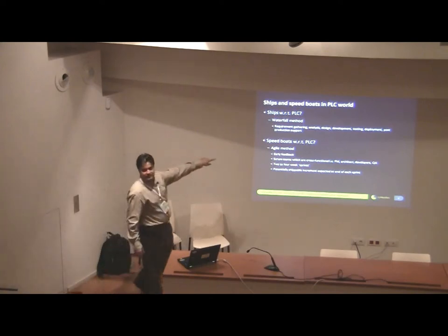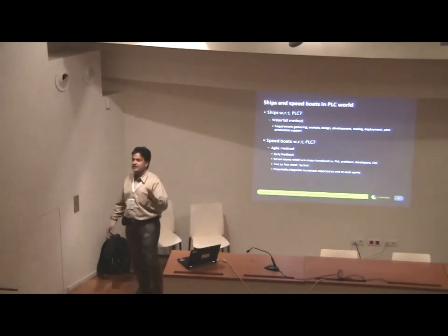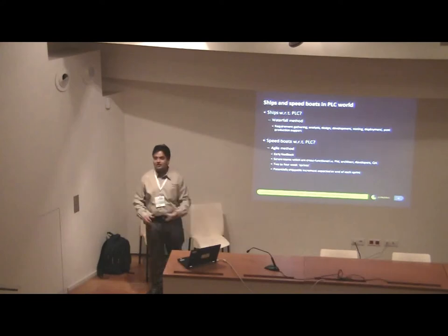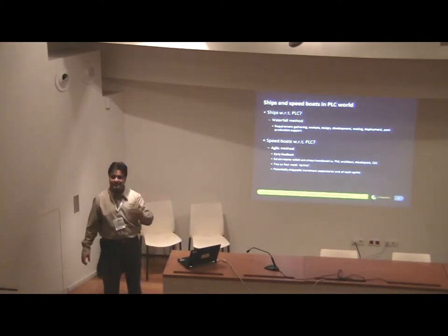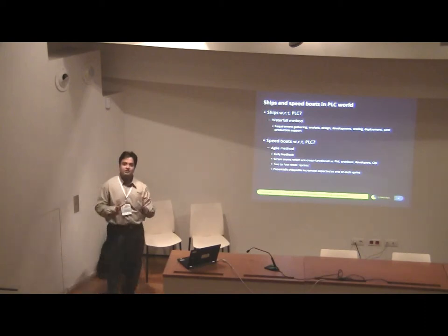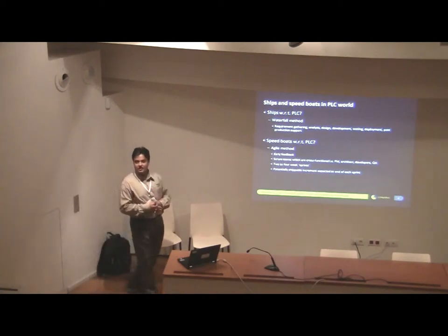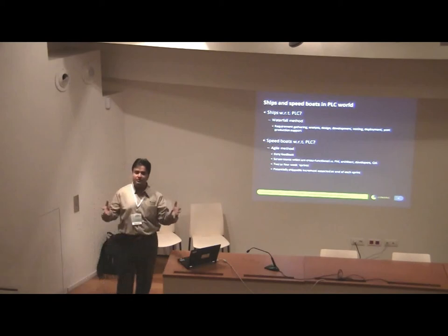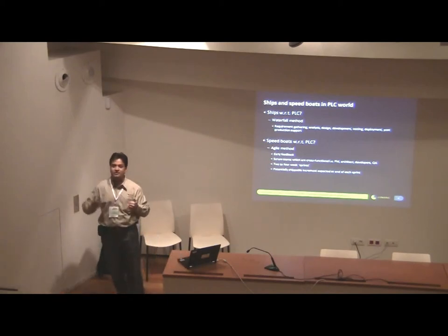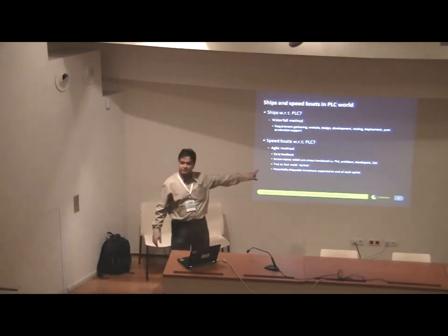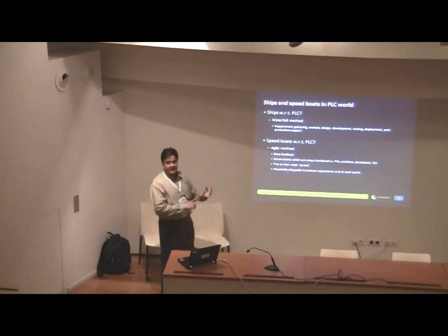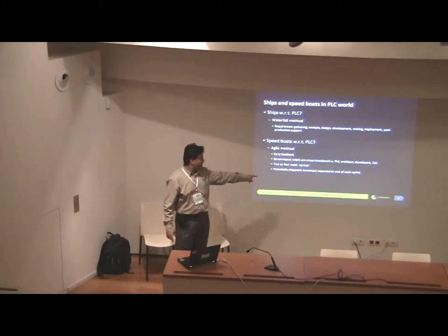Now, here are some of the features of Agile. I'm just giving a brief intro, just in case you haven't come across Agile yet. So it's an early feedback mechanism. You have the concept of Scrum teams. This is very specific to Symantec. At your organization, you might be implementing Agile using a different method. But here we have the concept of Scrum teams, which are essentially cross-functional. So you might have a Scrum team which has 6 or 7 people, and all of them are from different roles. You'll have developers, designers, QA, and the project manager, all sitting on the same team. Then you have the concept of sprints. As the name suggests, sprints are typically 2 to 4 weeks. The goal is to come up with a potentially shippable increment expected at the end of each sprint.